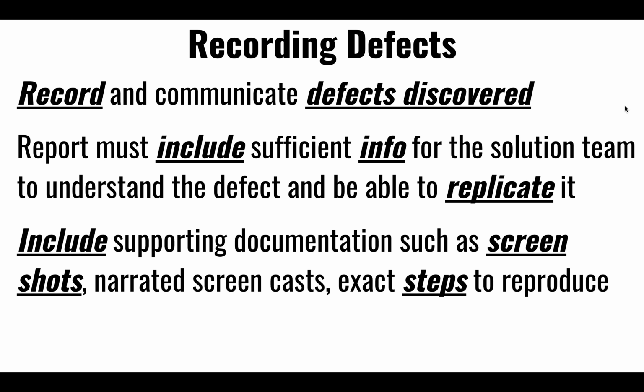one of the first things at sprint planning, the Scrum Master along with the team can groom the backlog, identify some of the bugs that have been accumulating over the last couple of sprints, and decide to fix them.